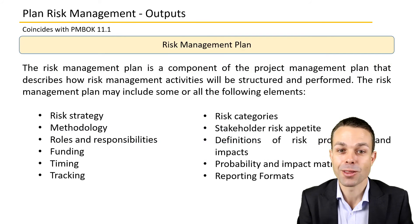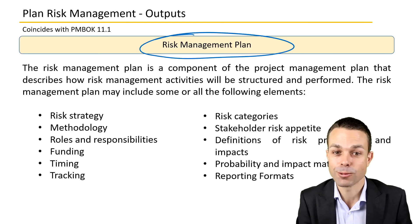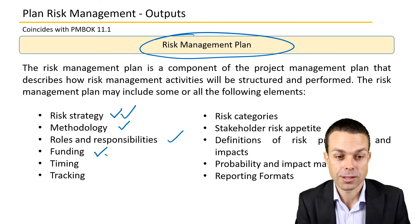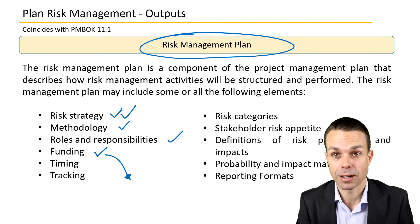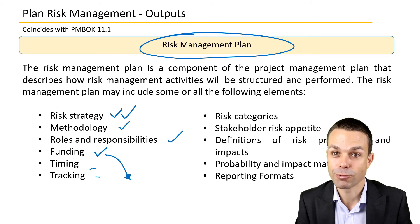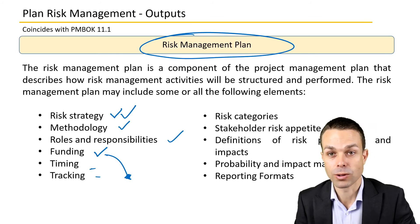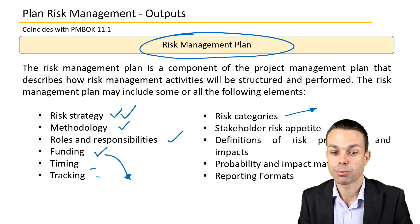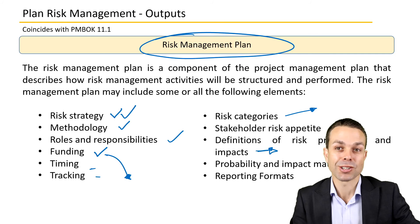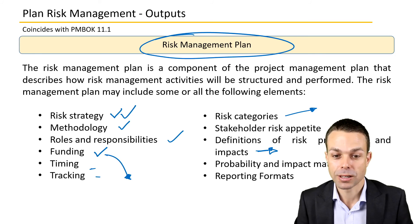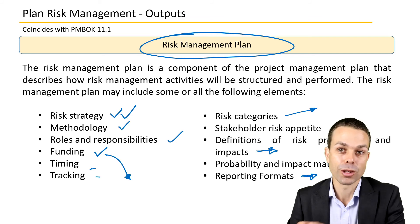The output of this process is the risk management plan itself. The risk management plan can include: the overall risk strategy, the methodology for gathering risks, roles and responsibilities in risk management, funding for risks — whether we have a contingency fund or management reserves for unknown risks — the timing and tracking of risks, risk categories, definitions of risk probability and impacts, and reporting formats. Once we've found our risks, we need to assign the likelihood of them happening and the impact, so that we know how serious they are and how we're going to report them to the overall project.